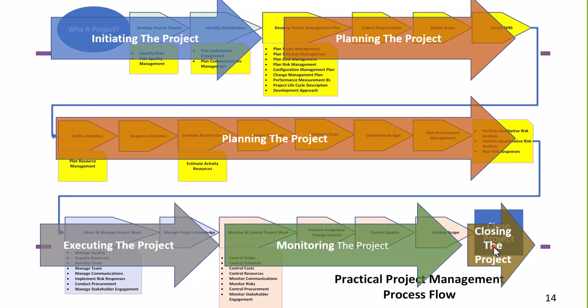So it's a one-time thing. Now, that may be many deliverables, but it's a one-time thing, and it's usually at the end of the project where we transfer that deliverable to the customer. Agile, we deliver value to the customer frequently. And we don't do it at the end of the project, but we do it at the end of each iteration. So there's a big difference there between Agile as well as Waterfall.